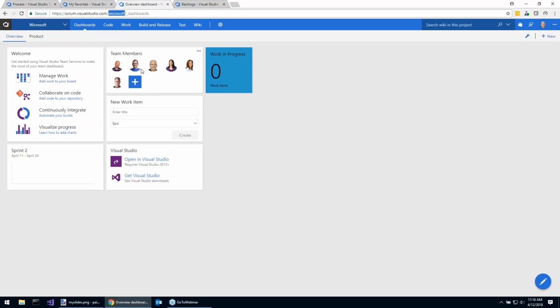Here we can see team members. I've got myself plus 4 or 5 others here that are going to represent my team. Going back to the Scrum framework for a second, someone's going to be our product owner. So in this case, it's Paula here. She's going to be the person that's responsible for driving the value in the product, the software that we're delivering. So she'll be the one that's ordering the backlog and making decisions around the value, deciding which items maybe should be towards the top of the backlog and delivered next, and which ones maybe can wait for another release or 2.